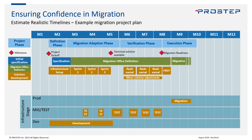It's absolutely normal that you find additional things you want to implement or change when looking at the whole dataset. Always plan for minor solution adjustments in between. I would plan for at least two rehearsals — the blueprint has three. In parallel, you're setting up the migration office, which we'll talk about later. And last, when everything is concluded and everyone is clear about how the productive migration will run, you execute the actual migration. Always plan for a separate migration infrastructure — don't use the same infrastructure from the deployment project. The data migration project needs a stable environment.